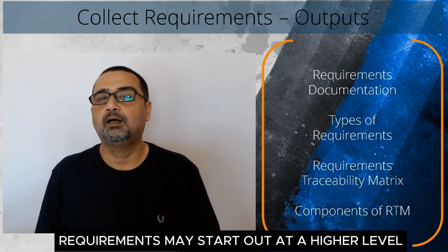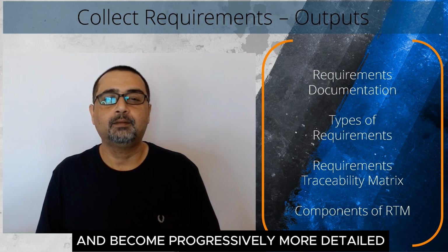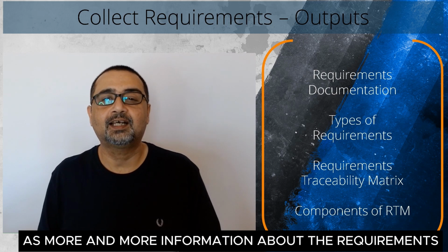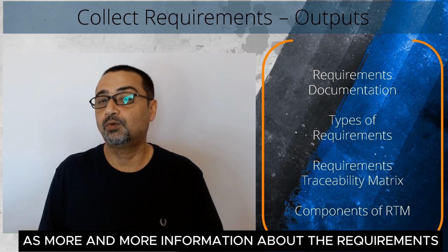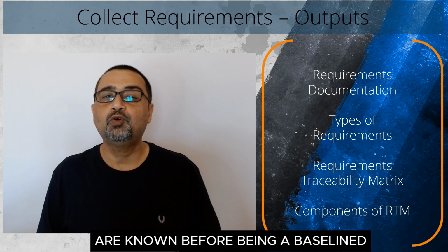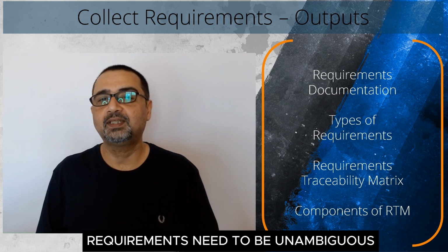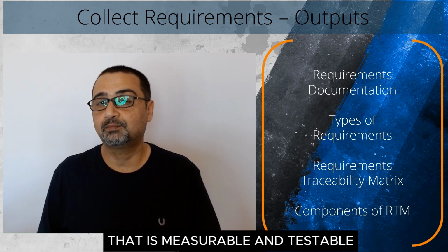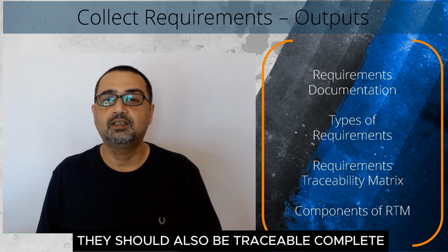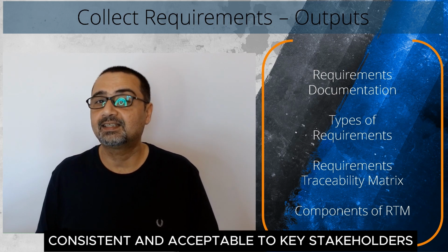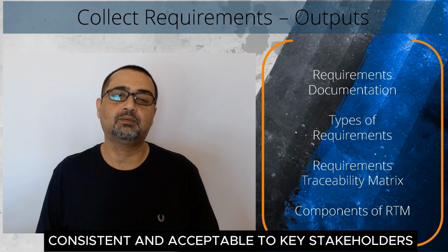Requirements may start out at a higher level and become progressively more detailed as more and more information about the requirements is known. Before being baselined, requirements need to be unambiguous, that is, measurable and testable. They should also be traceable, complete, consistent, and acceptable to key stakeholders.